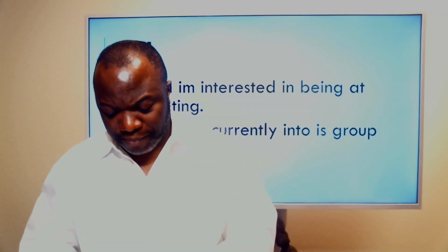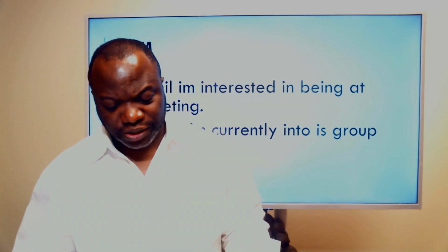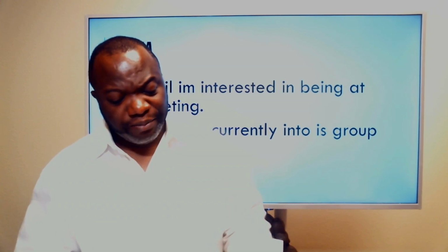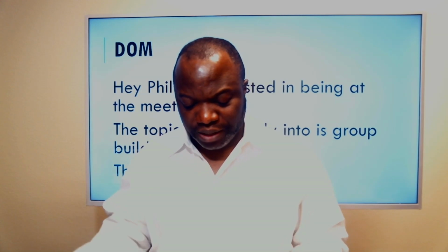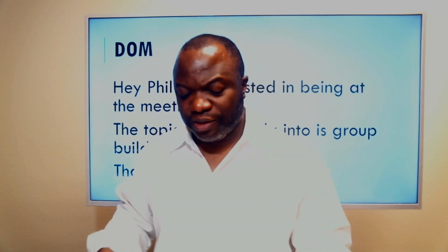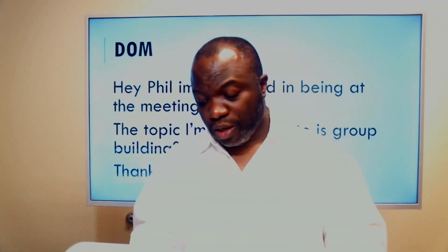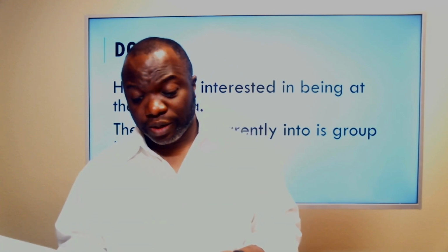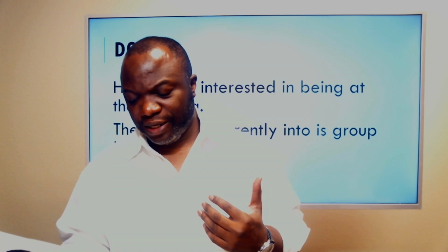Bringing it back to the PMBOK guide though, talking about the 5 stages of team development, Tuckman's ladder, your team building, the reason why you are building the team is for them to burst through this. This is on page 338 in the PMBOK guide, 6th edition, Tuckman's ladder. And it says, although it is common for these stages to occur in order, it is not uncommon for a team to get stuck in a particular stage or regress to an earlier stage.